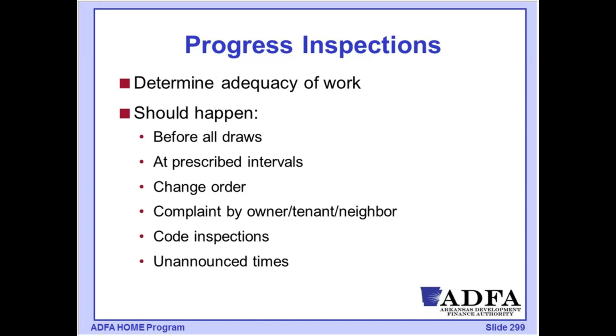So our inspections are required before all draws. Before a contractor can be paid for work that's completed, that inspection has to be completed to look at that scope of work that they are saying we're eligible to be paid for, to make sure it's been completed and that it meets those specifications. That needs to be done before each draw.